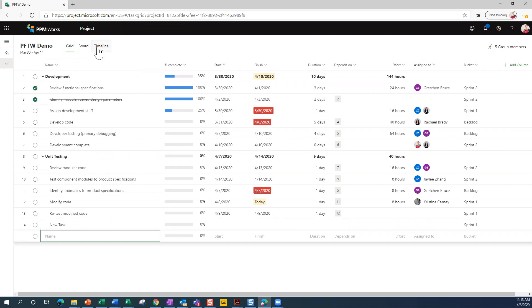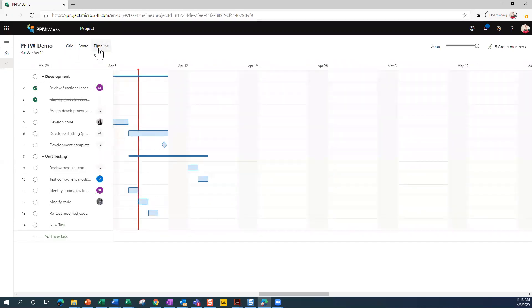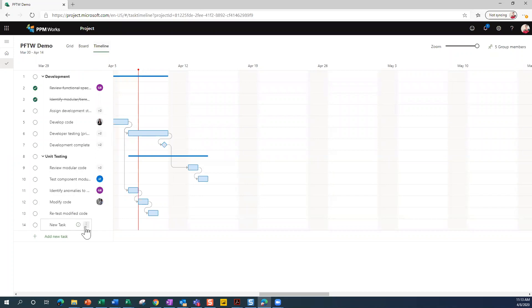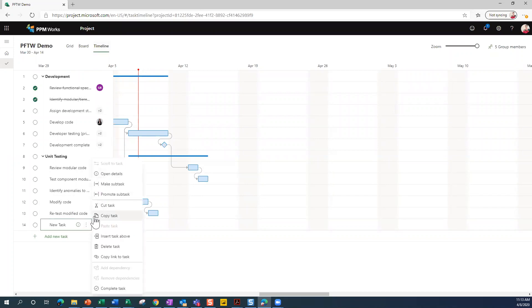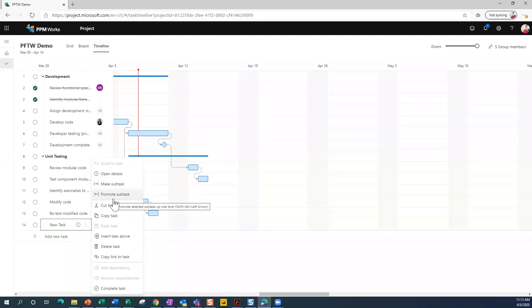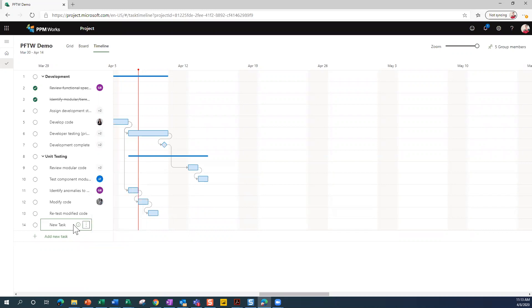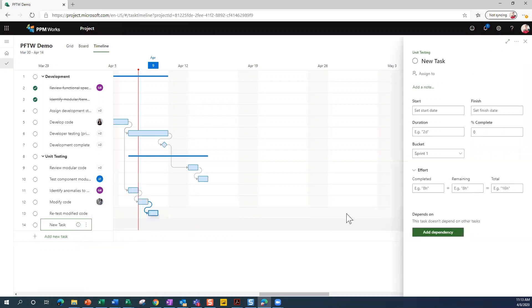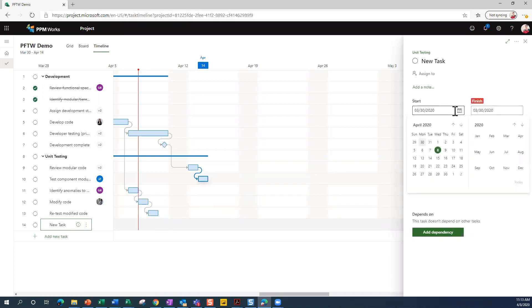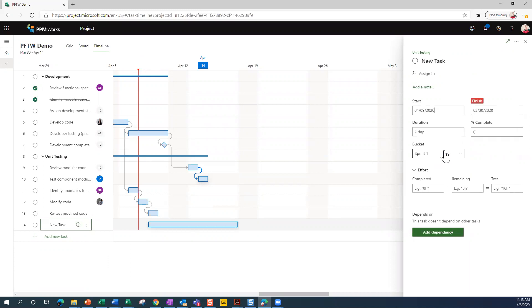And then when I go back over to the timeline for this particular task, new task, I want to see that task bar in this particular view. But if I come up here to scroll to task, it's blank. And that's because I haven't set any details for this task. So I need to come in here and set a duration for the task, so it at least knows when I expect it to start, how long do I expect it to take, and so on and so forth.